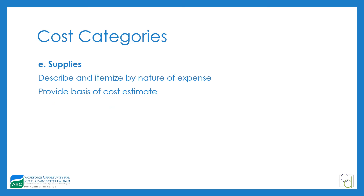Next is supplies — anything with a unit cost under $5,000 or a usable life of a year or less. The cost estimate basis could be vendor quotes, historical costs to your organization, or some other defensible means. As with every other section, make sure you explain in your budget narrative where these figures come from.